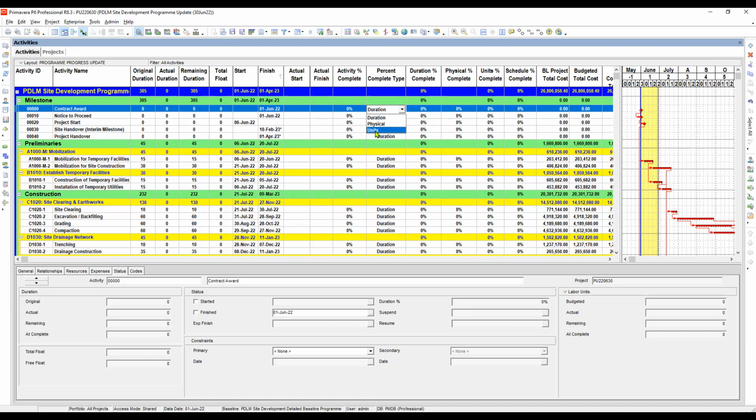And the value exists only when the activity has a resource assignment. That means there should be an actual resource loaded or updated in the resource of the activity before it shows a value.